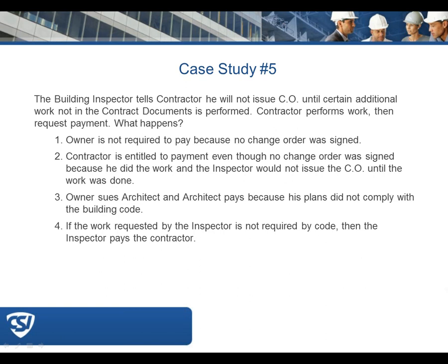We have one more comment here coming in from Kevin. Contractor not responsible for implied warranty under the UCC. Rather, the manufacturer seller is responsible to the contractor for the implied warranty unless the purchase order or contract documents contain explanatory language. So that kind of goes back to the comment that was a recap from case study 4 into our most recent case study.